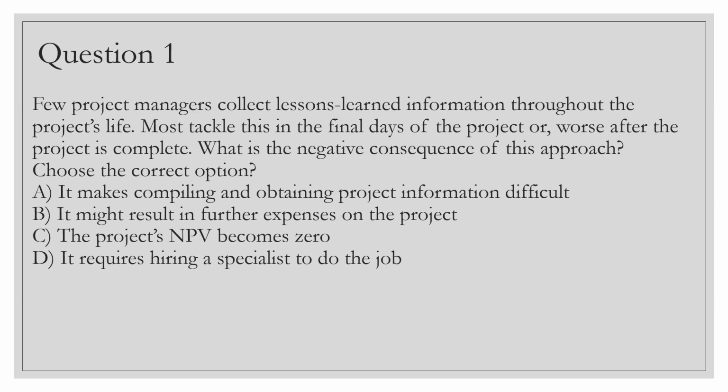So remember always that lessons learned, of course, is one of the activities in the closing stage, but the closing stage says compile the final lessons learned. It never says that start the lessons learned and complete it here. Lessons learned is something which has to be done throughout the project life cycle. In fact, right from the time your execution has started off, that's the best time, or golden time, to start off with a lessons learned document. And every team member has to punch in their details.